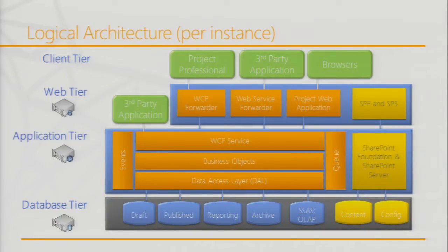So we've got a first database. It's called the draft database. And typically think of, Christophe, I'm creating a plan, but I'm not sure on the estimates. I'm not sure who should be working on that plan. So I'll go back in the office and I'll talk to my colleague who's also a project manager who's done a service pack deployment. So I push that data, it's stored in the drafts. If my PC is stolen, if it's broken, whatever, the data is nice and safe in a database. And the switch from draft to the next one, publish, is when I'm happy with the schedules.